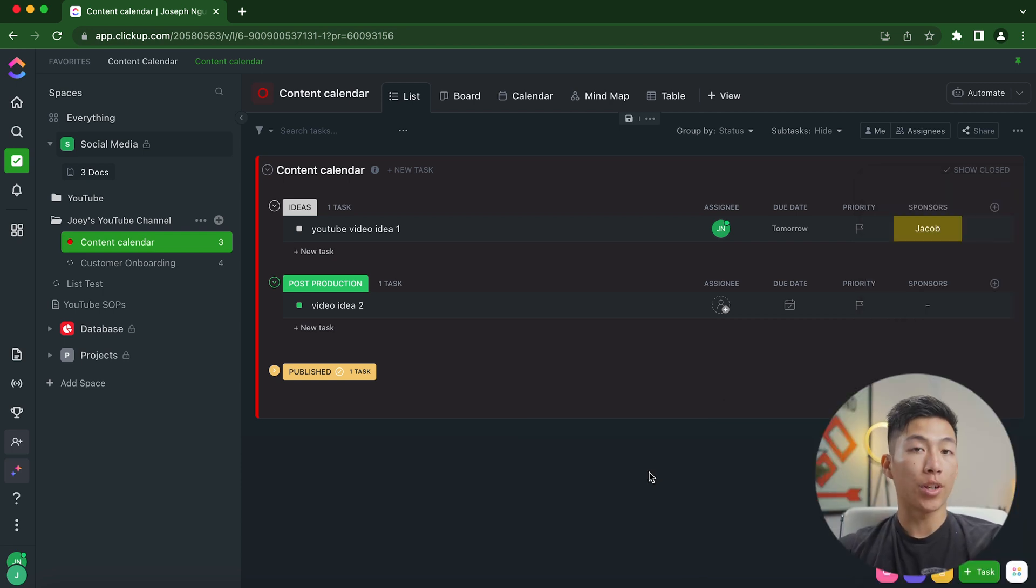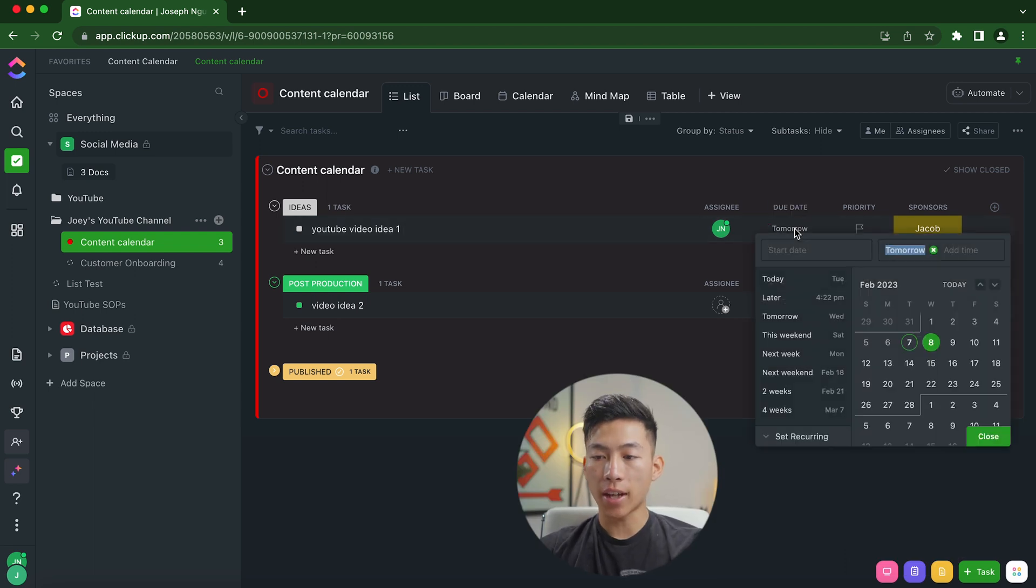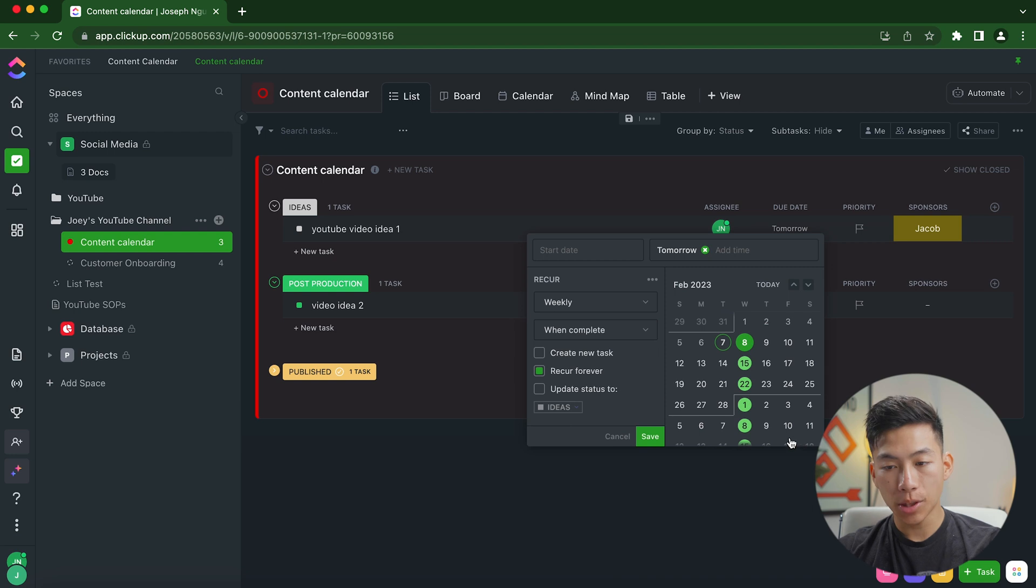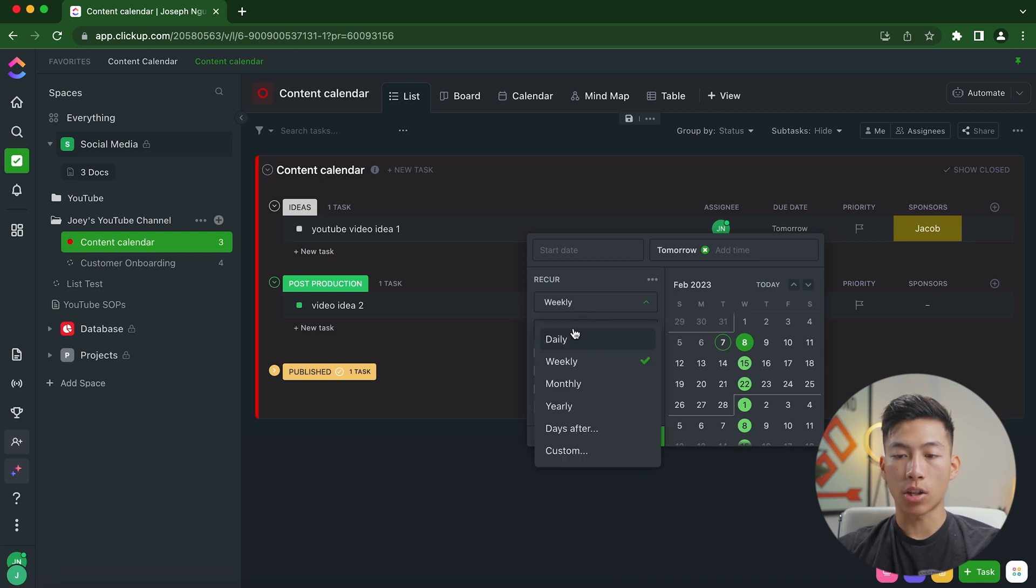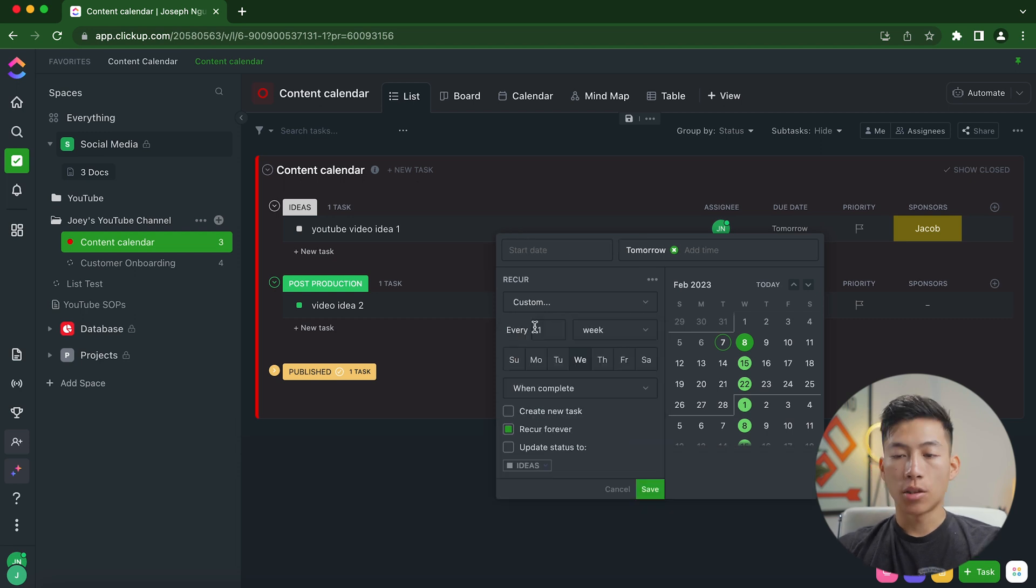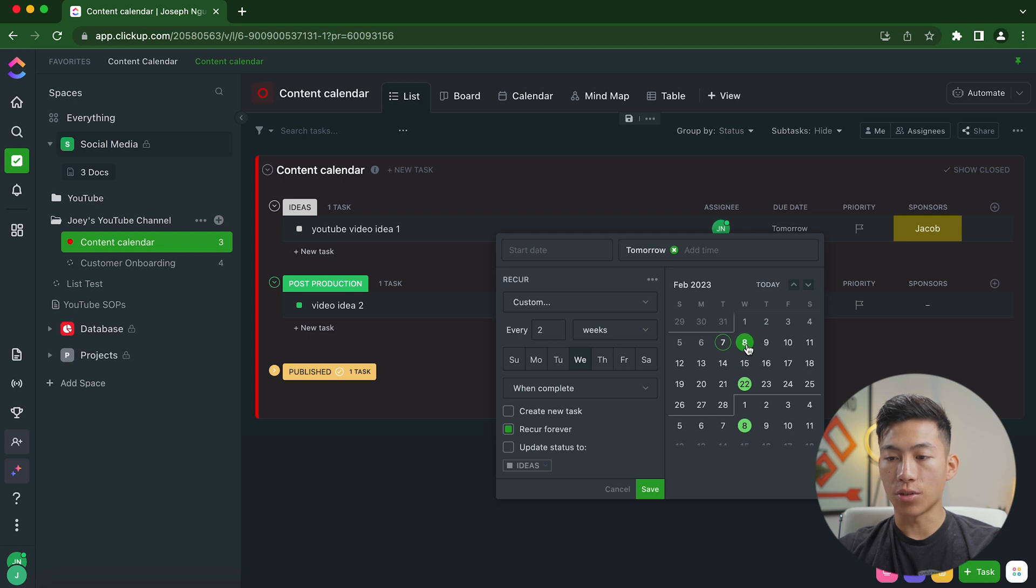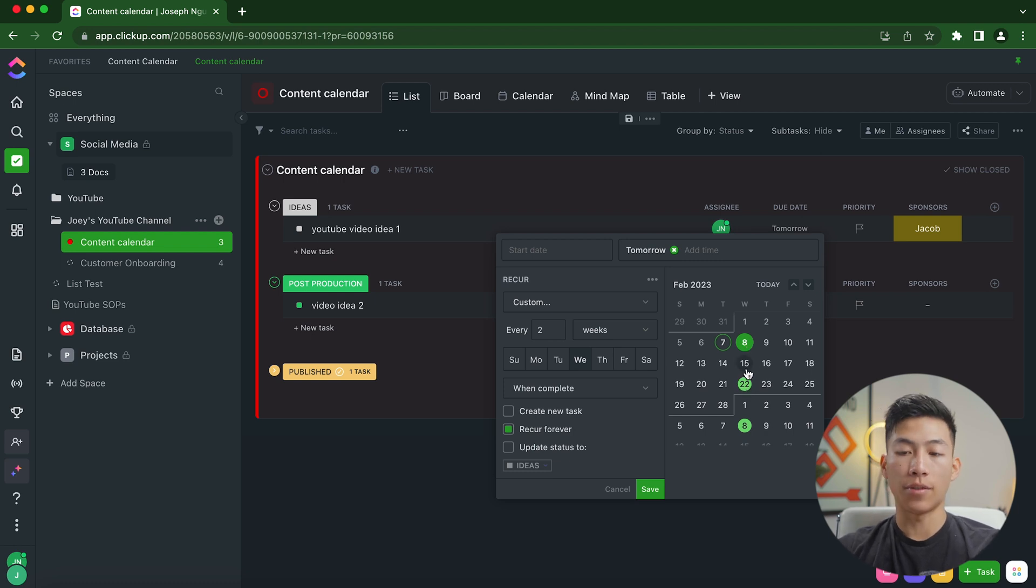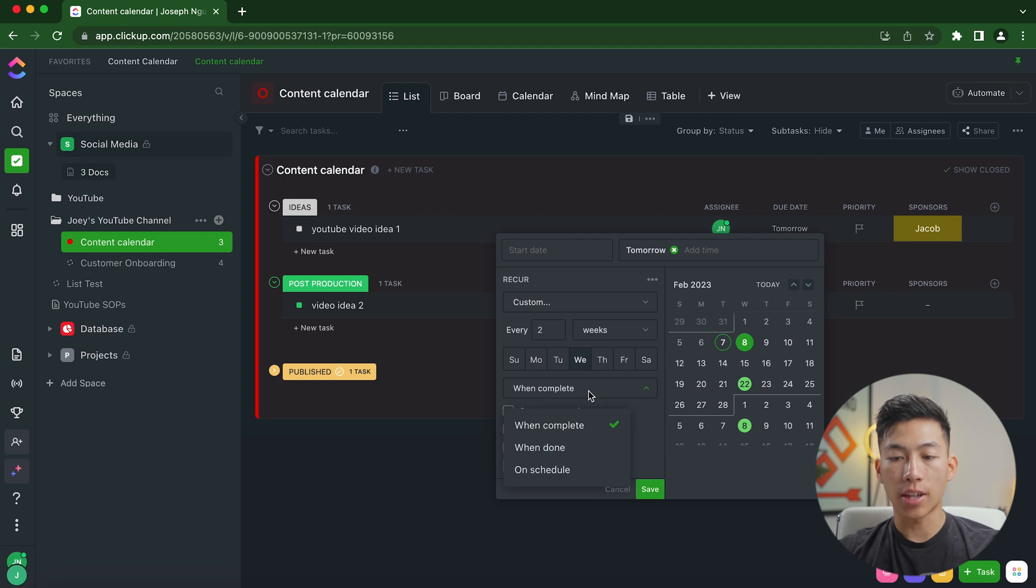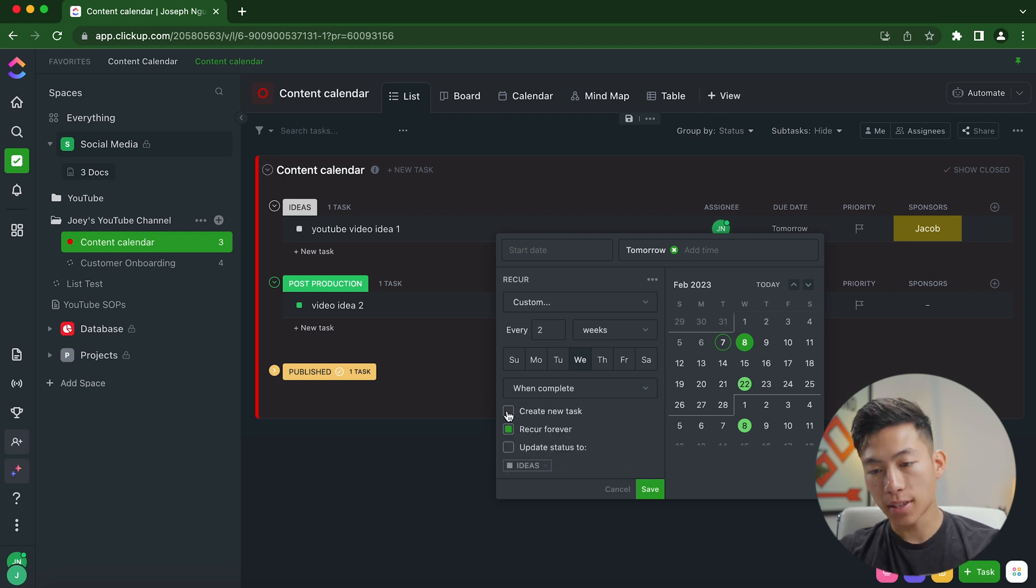Going back to when I was talking about recurring tasks, right here for the due date, if I go ahead and click on the calendar, you can see right here that it has the set recurring option. And from here, it's going to ask me if I want to recur it daily, weekly, monthly, yearly, or I can even do custom. So let's say I want to do it once every two weeks. So I would just have to change this to two. And you can see that it's going to do for every Wednesday, and it's going to skip every other week. I could change what day that it recurs. And I can also change that when it's complete, when it's done, or when it's on schedule, I can create a new task, or I can just update the status.